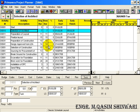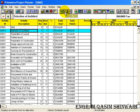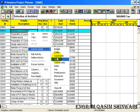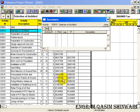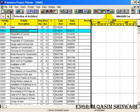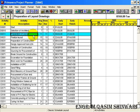For the selection of Architect activity, I am going to use another method of adding the successor: right-click, go to Activity Detail, and click on Successors. Highlight the Activity ID field and add D0011, then press Enter. Close it.